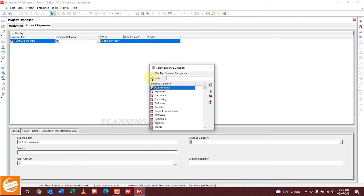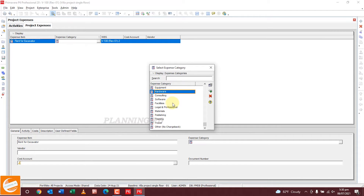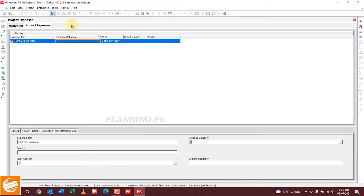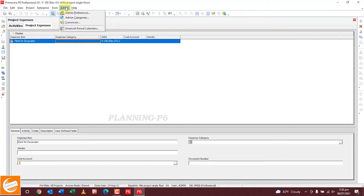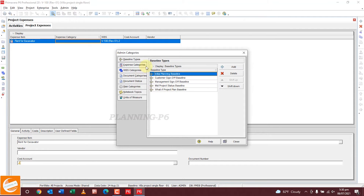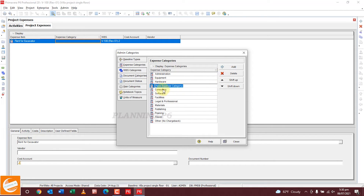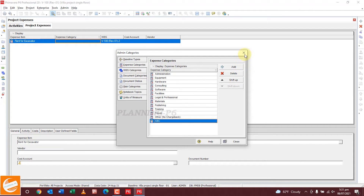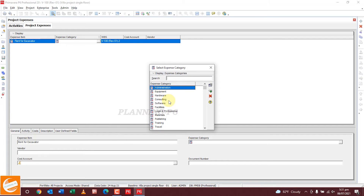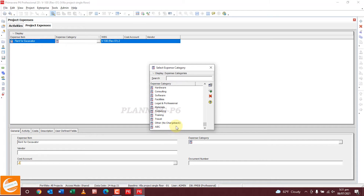For the expense category, add the category. If you don't find the category from here, you can add one using Admin Preferences. Go to Admin, then Admin Categories, then go to Expense Categories. Now you can add a new expense category — ABC or according to your project, whatever you wish. You can add it and shift it down to the last position. Close it. Now you can see ABC here along with all other major categories. If you want any additional category, you can add it like this.